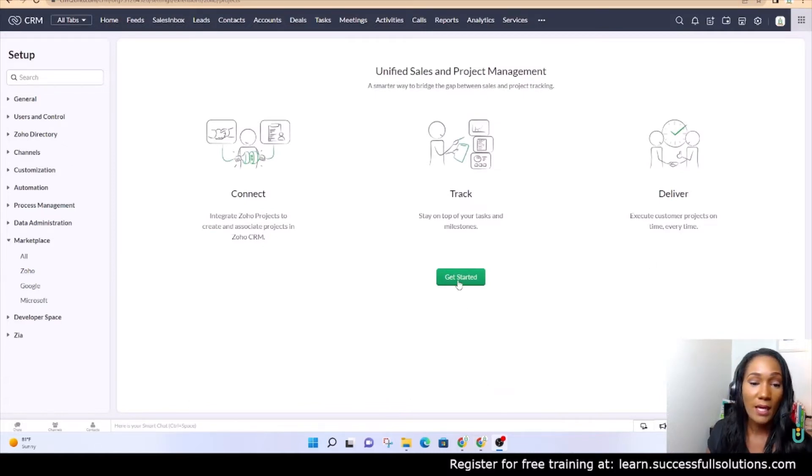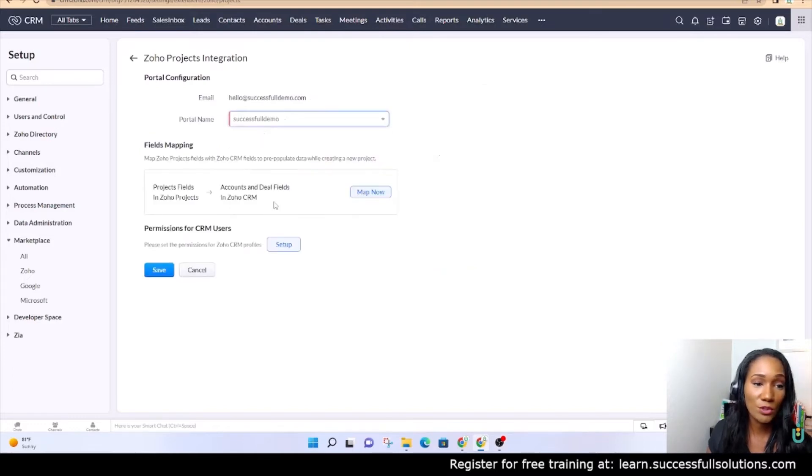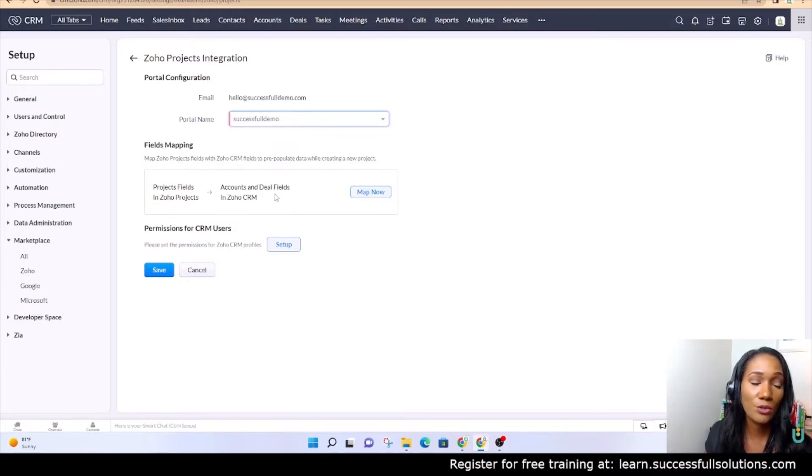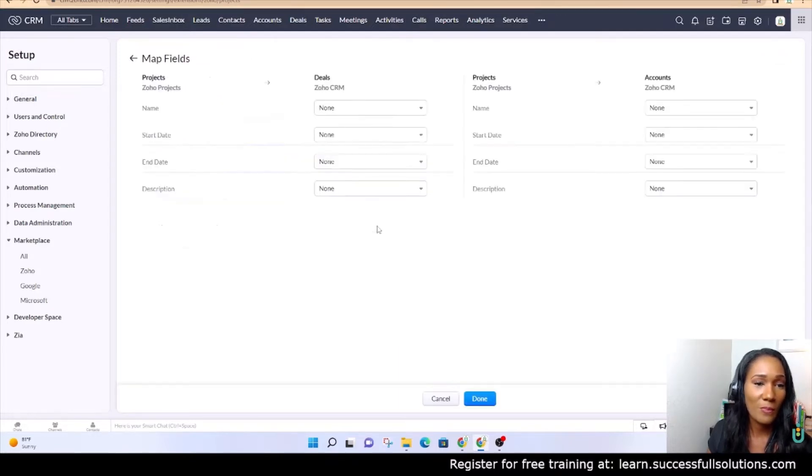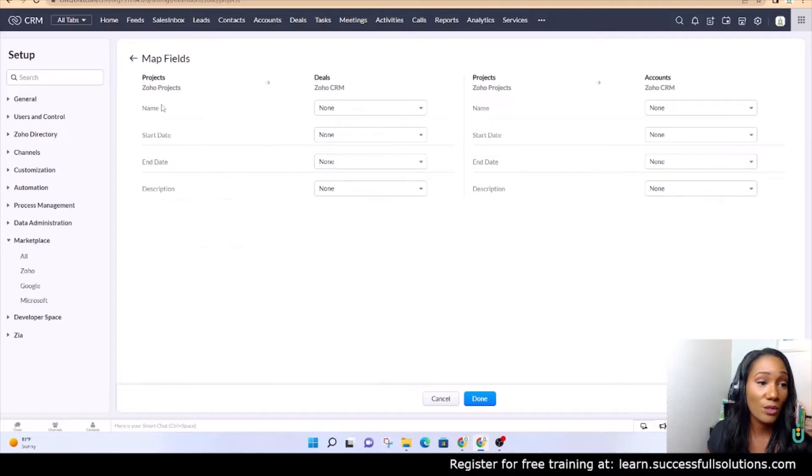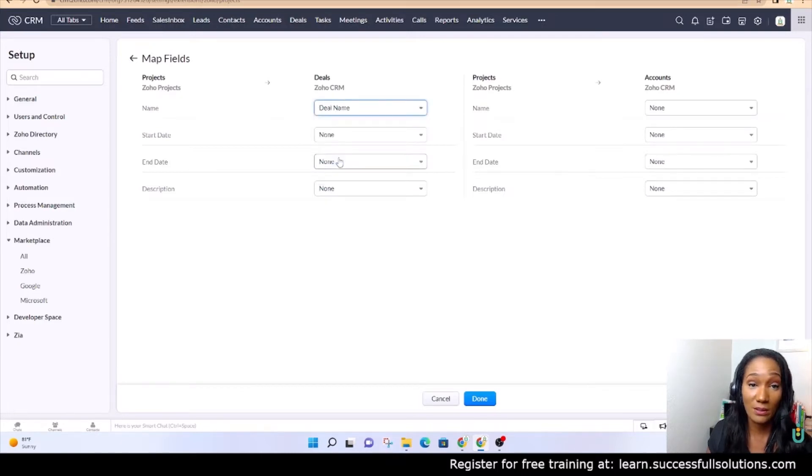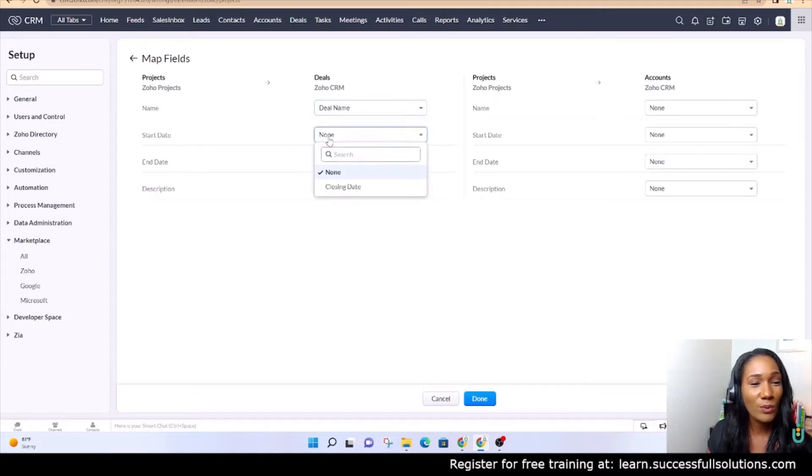Now, get started. The portal, there's only one, and it's basically telling you that these project fields in Zoho Projects are going to sync with the accounts and deals fields in the CRM. If you click on that button to map it, it lets you know the name of the project in Zoho Projects is going to be equivalent to the deal name. We want the start date, we don't want to map that to the closing date, which is all we have right now in the CRM, so we're going to skip that one.